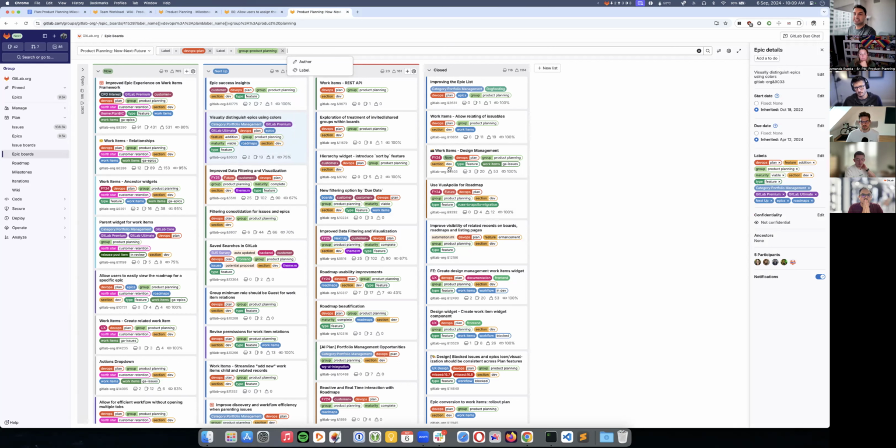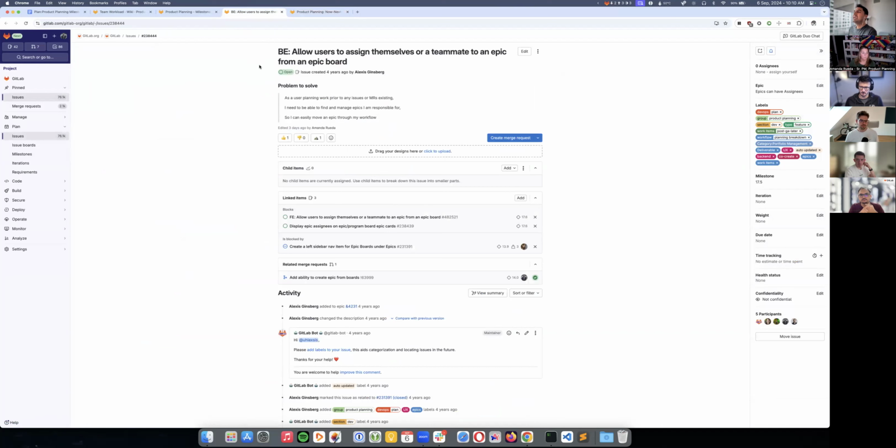So in that case, we are still at least a few milestones out, because we have an issue around creating a replacement for legacy Epic queries to update our boards with work items, where front end would just change the name of the query, and we are going to be using something called presenters on the back end, which will actually fetch the data from work items table and then show it here. So this issue in that case is blocked by the drawer work for now, and then filtering and everything can come later after we replace boards app to use work item based query.